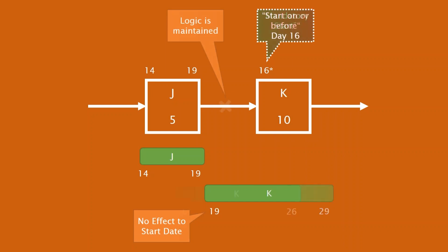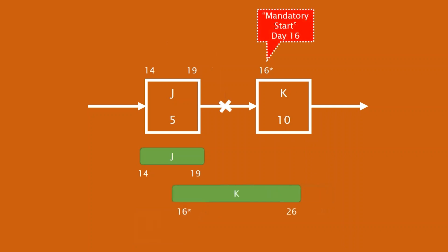Now let's do a contrasting example. Mandatory starts. This is a hard constraint. Let's say mandatory start on day 16. What happened after we applied that? Well, as you can see, looking at the Gantt part in the bottom, the logic tie is broken. And activity K doesn't care that there's a finish to start relationship there. Activity K is now moved to day 16. So that is one of the challenges of using the hard constraints. So that is an example showing the contrast between soft constraints and these mandatory or hard constraints.